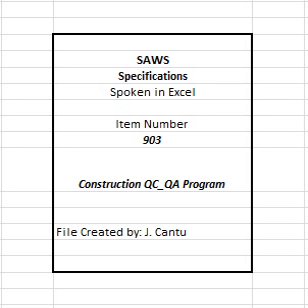The contractor shall place a competent person on site to oversee the QC system. This person, along with an approved alternate, must have full authority to act for the contractor on all QC matters and shall be on site during all phases of construction activities. The responsibilities include testing, materials, workmanship, methods, and techniques to provide that all work is constructed properly by qualified, competent, and professional craftsmen and/or tradesmen.